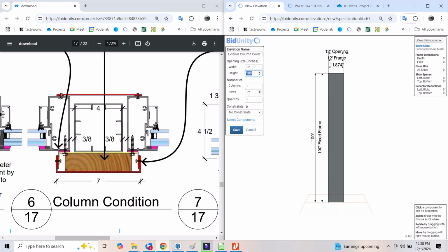And the height of the sheet comes 120, and the number of columns we put corresponds with the number of bends, so that would be 1 face, 2 faces, 3, 4, 5. I'm going to put 5 columns. There's a little bit of labor associated with each of the columns.